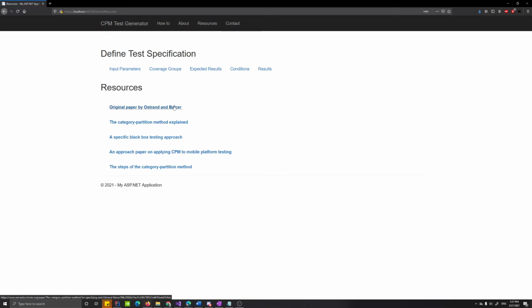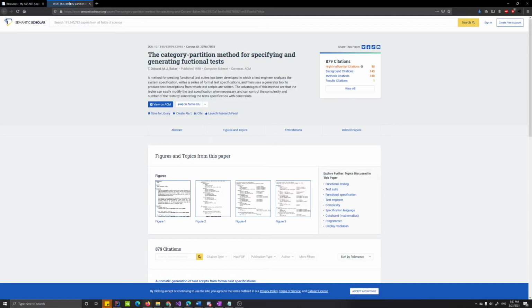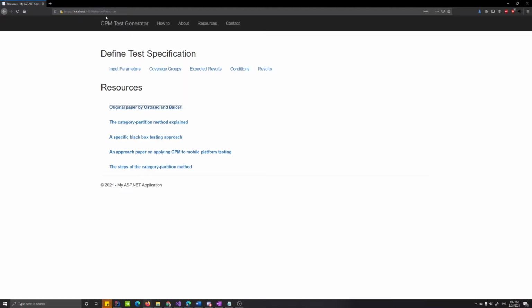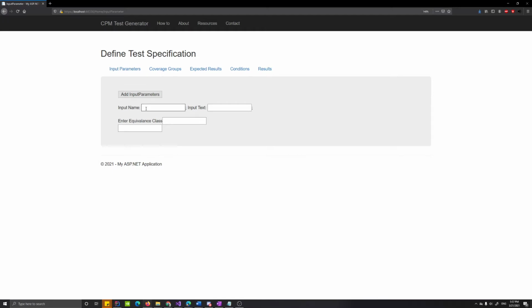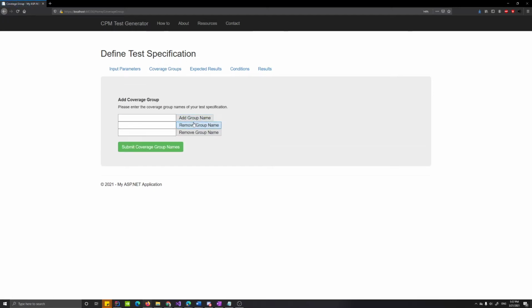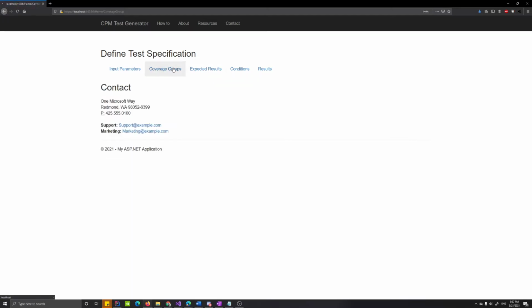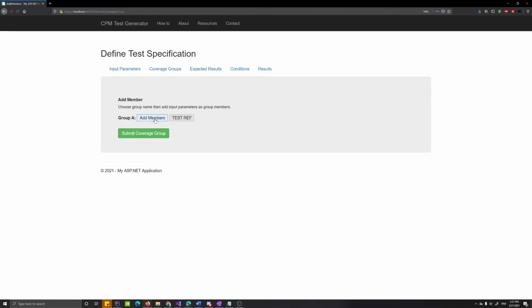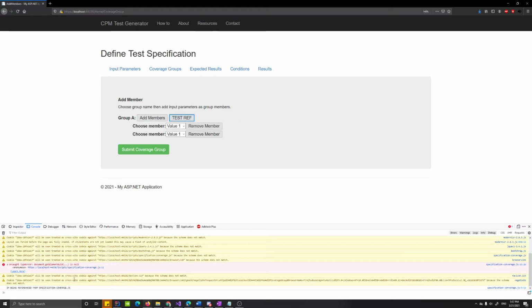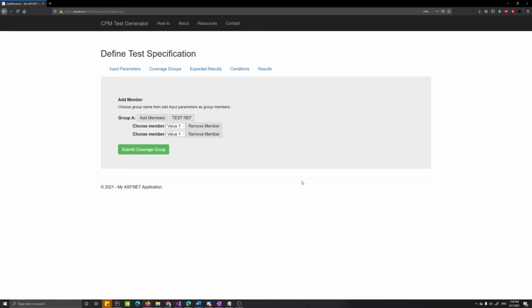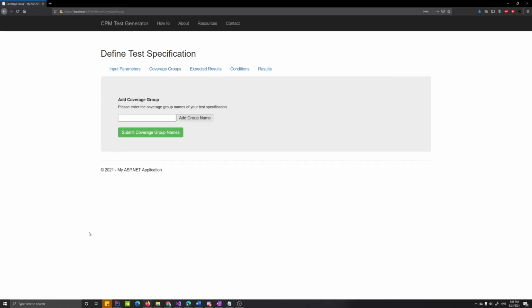I feel like I spent too much time trying to work alone on the back end, right? I should have really just seen through it right away that we really need the front end part, right? We really need to get this user interface going. So hopefully, even if we didn't finish this sprint completely, we would be able to have a better base of a GUI, so we could actually define some behavior in the backend. But yeah, that's how I plan to fix this next time.